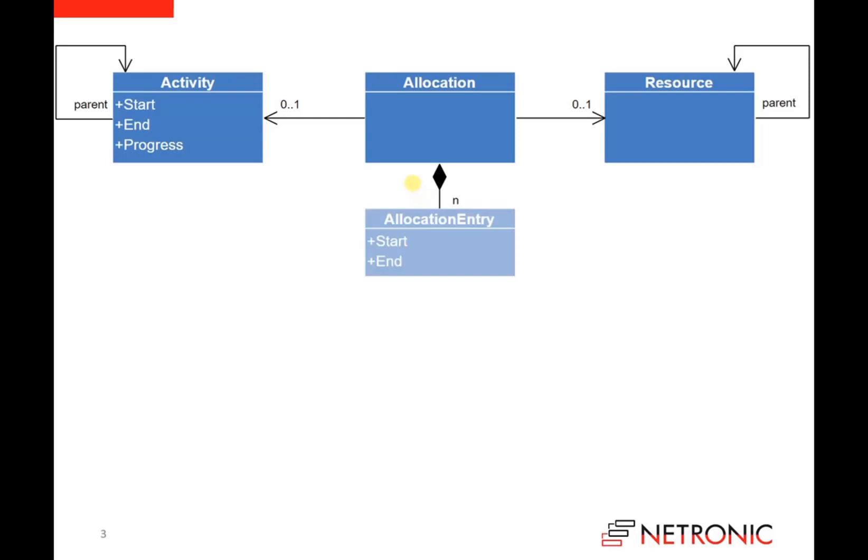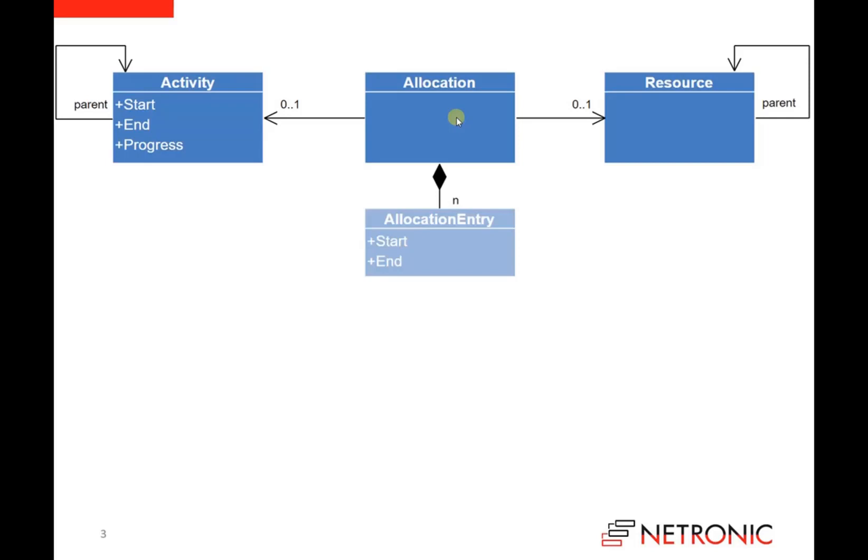Each allocation can have a reference to an activity and as well a reference to a resource. And you can create multiple allocations with reference to the same activity or with reference to the same resource. This way you can design the situation where multiple resources are assigned to an activity, or where multiple activities are assigned to a resource.